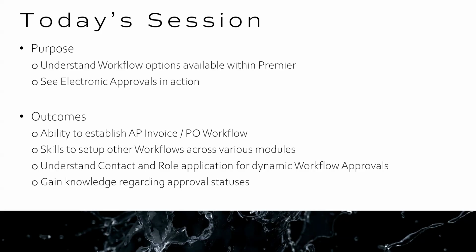Ours are currently outside of the system. When we're letting a contract or a purchase order in the first place, we go through an approval system where the CAs will assess the package, and then it'll come to the project manager to review and sign off on. If it's a value over $30,000, we then send it up for our construction manager to approve and sign off on as well before we send out the purchase order or subcontract.